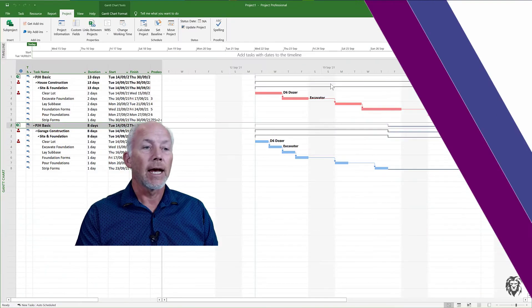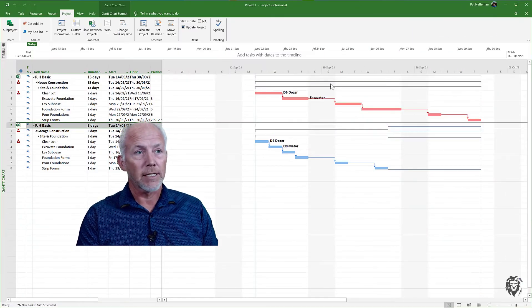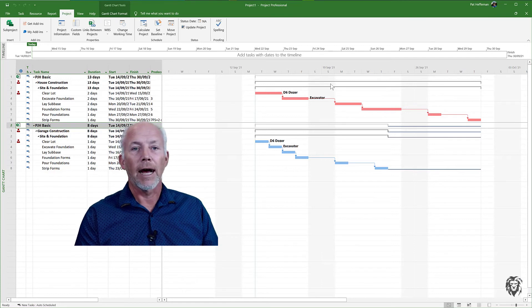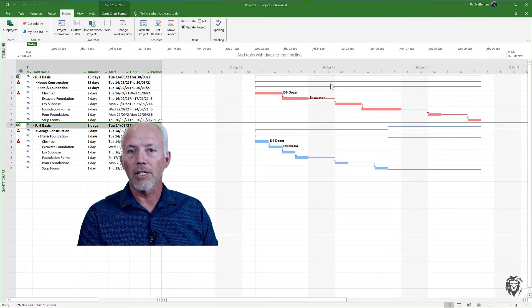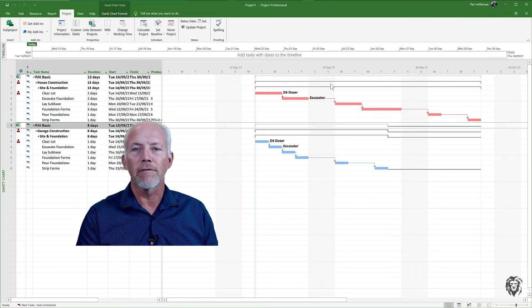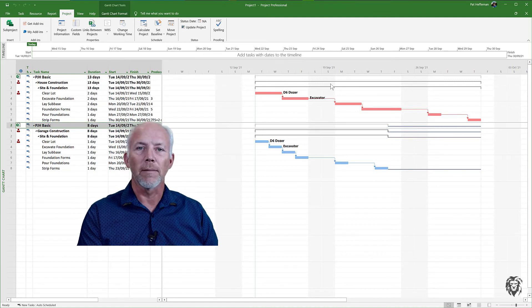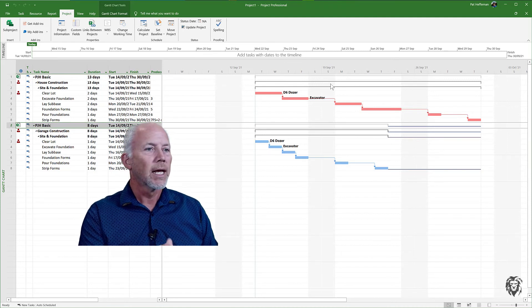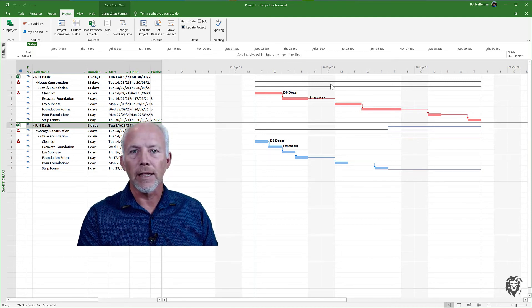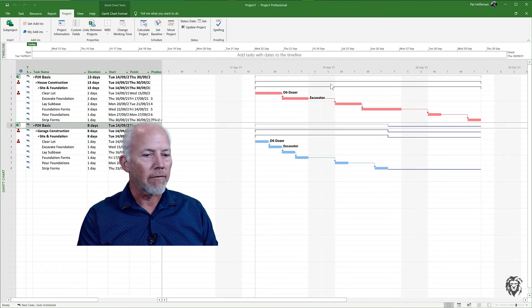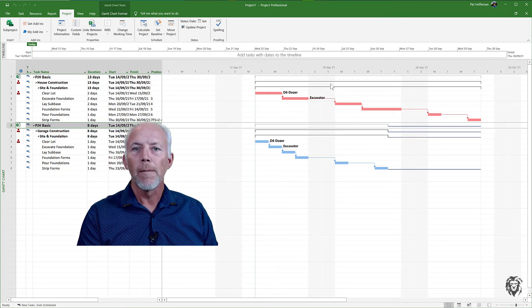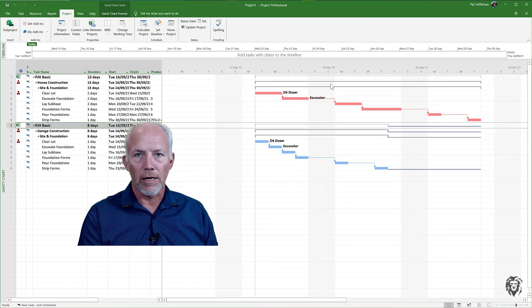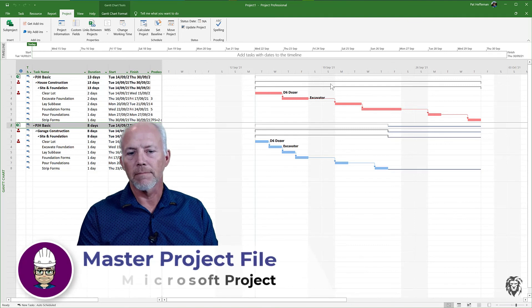You can manage your projects either from the common master project file or from the individual project file that you have open. That's really all there is to it. It's a quick tip on how to manage these little projects all together without having a thousand different files, particularly if you're working from a common resource pool. I find this trick fairly useful for a lot of little projects which most of us manage quite often.